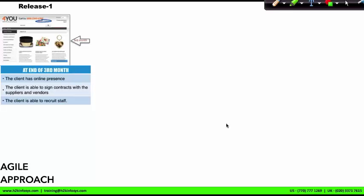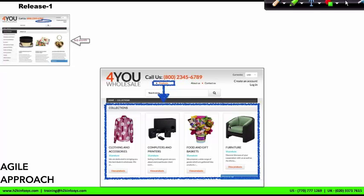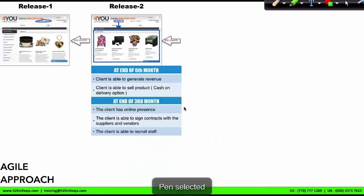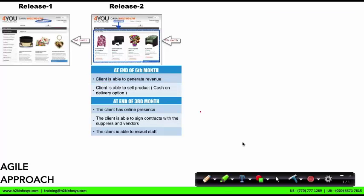Next, to add early value to the business, I commit to the client to deliver the second module of working software by the sixth month. In this case, that is the ability to add products on the website, which allows customers to purchase products by ordering on the phone with a cash on delivery option. By the end of the sixth month, the client is able to generate revenue. Let's call this release two.